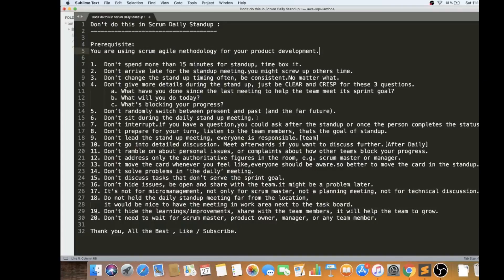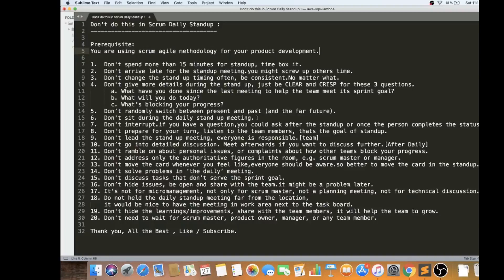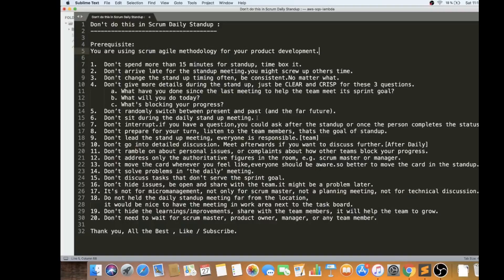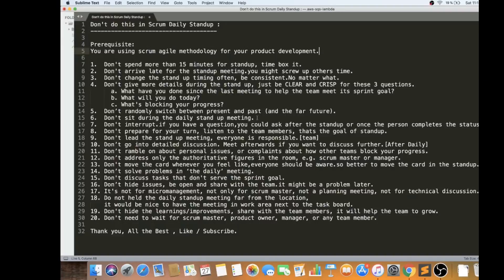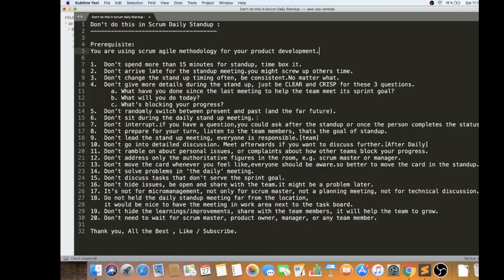The tenth point is don't go into detailed discussion. Meet afterwards if you want to discuss further. For example, after daily, I have seen some practices like there is something called after daily discussion. During the update, if you get some opinions, different opinions, move that discussion after daily. Whoever is interested in that discussion, you can pick them and go and discuss independently and separately. Don't try because this is like a trap that usually happens in the standup. Then the discussion starts and it's like wasting the other team members' time. You might be losing your focus.